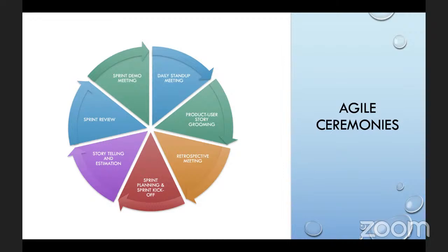So you do not want to do it 3 days or 5 days after the old sprint. That means you're already 5 days into the new sprint. So what new ways do you want to improve? So the idea is that we want to have this quickly, right after the sprint in flight has come to an end. And then we want to incorporate some of the new techniques and new things that we've learned, and what didn't go well in the previous sprint, into the new sprint, right?